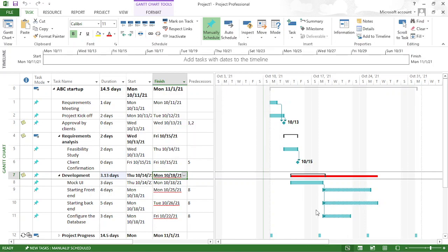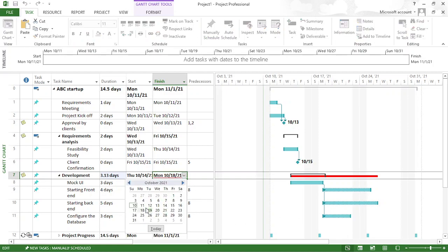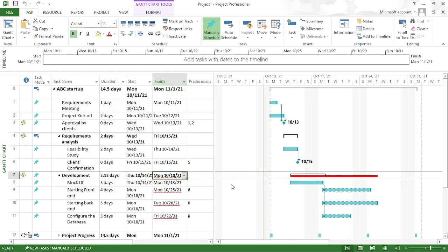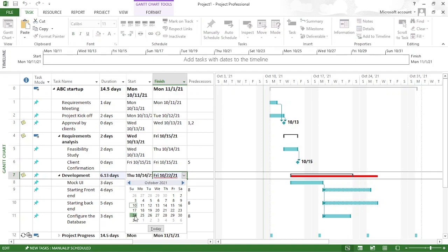You can narrow down the scope, and the project can be rescheduled like this, it's okay, but we have to eliminate some functionalities. Currently you have a login function with auth login and SSO, but unfortunately we are unable to perform that work. What we can do is give only the SSO, single sign-on, not the auth login. Is that okay? Then they'll say, all right, you can change up to the 18th or something, right? You can change different dates, and make the modifications according to your requirements, right?